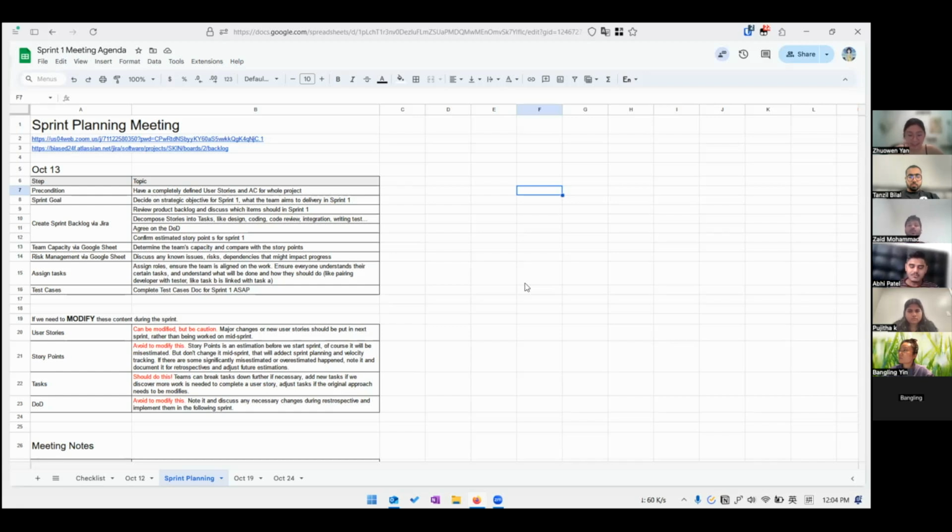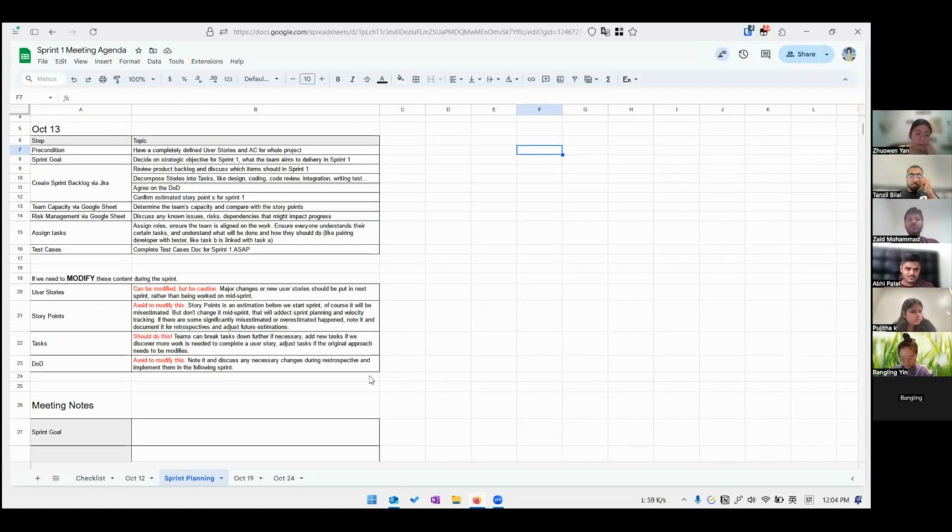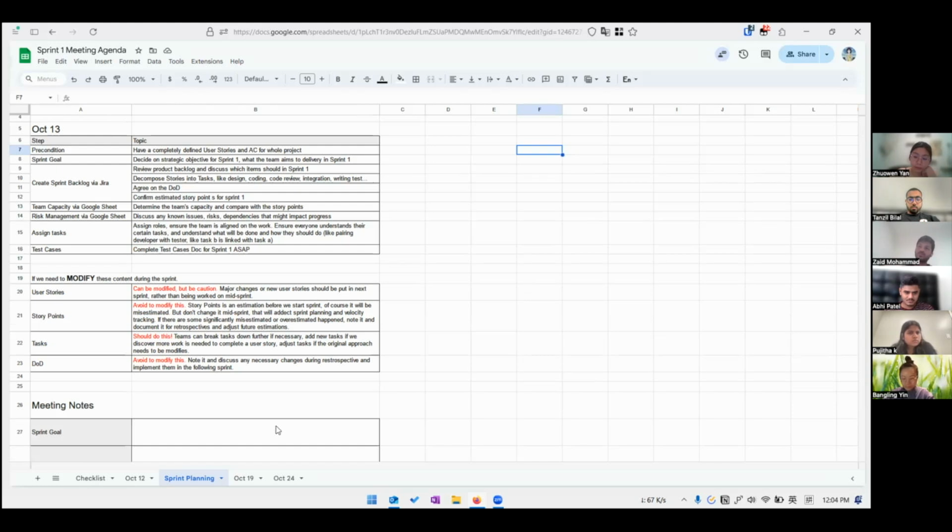Yeah, so as I already told you in previous meetings, we can divide our workflow into three major parts. One is getting a diagnosis using an image classification model. Then the other part is symptom integration, and the third part is real-time chat. I think these three user stories have the most story points, and in sprint one we can do image classification. In sprint two we can include the NLP-based symptom integration, and in the third we can add real-time chat and login and other features.